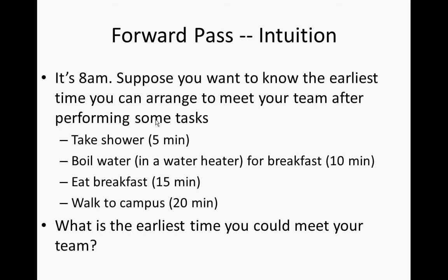You finish this by 8:05, and you finish this by 8:10, and you can't start breakfast until you finish both of them. So the earliest time that you can be ready for breakfast is 8:10. It's the maximum of those two times. Then maybe you eat breakfast, then you get up to 8:25, and then you walk to campus. It's 8:45.